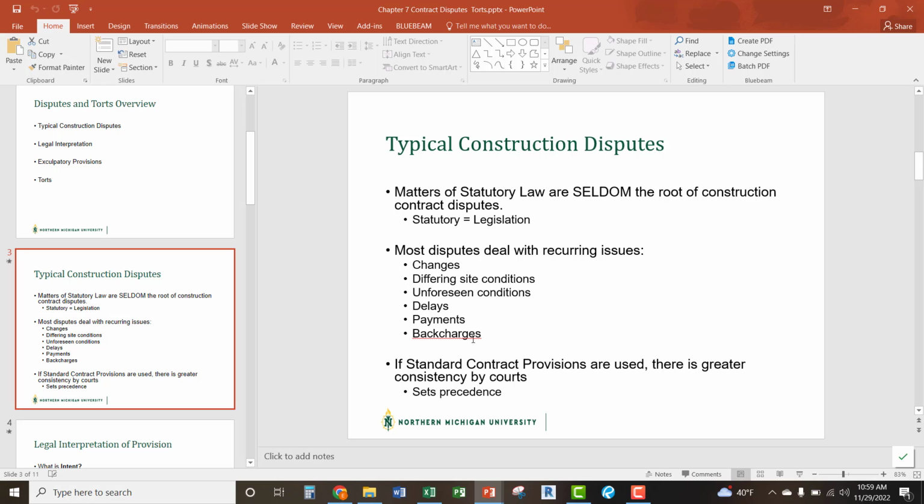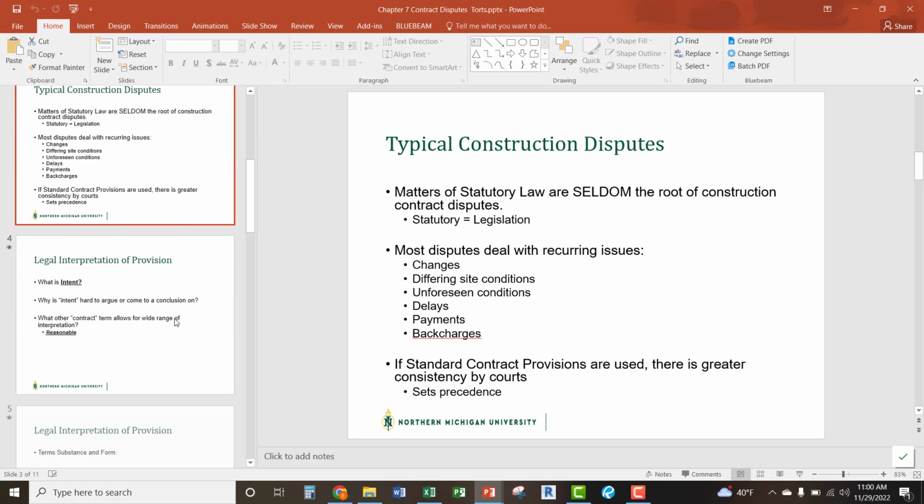You also get better at dealing with disputes and going through all that before you award contracts, like during the bidding phases, post-bid meetings, and pre-bid meetings, to lay things out and have the document signed, basically saying, "Yep, I understand that that's the process, and if I don't follow that process, I'm not going to be awarded back charges." That helps set the tone, but even more importantly, building relationships with your subs and with the owner and the architect teams, so everyone's on the same page, and that takes years.